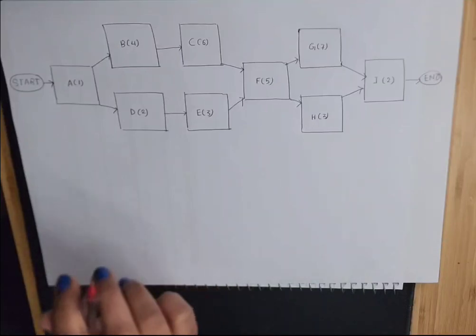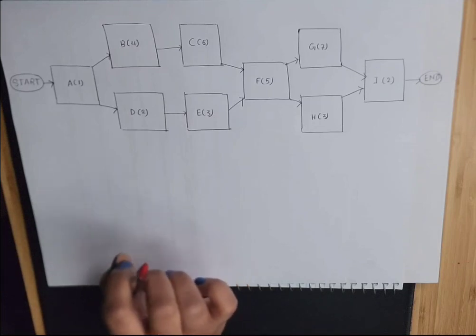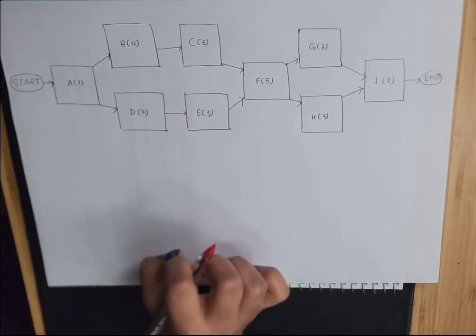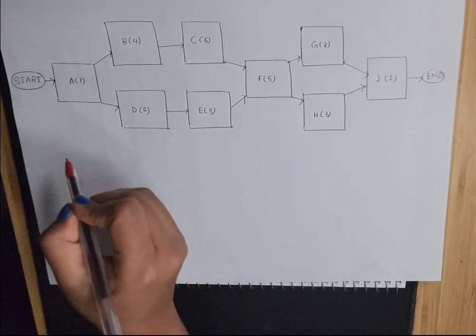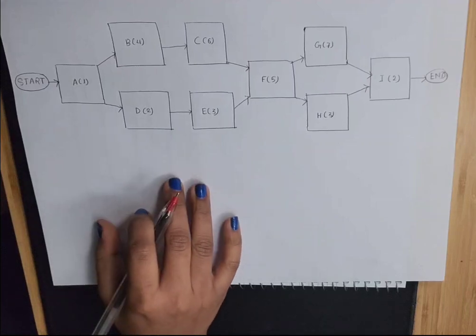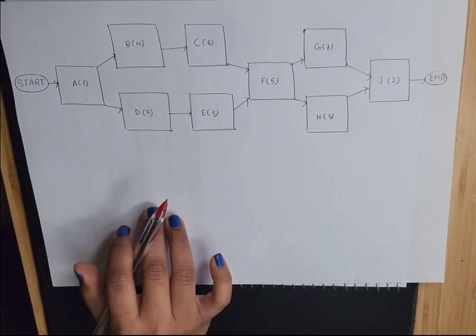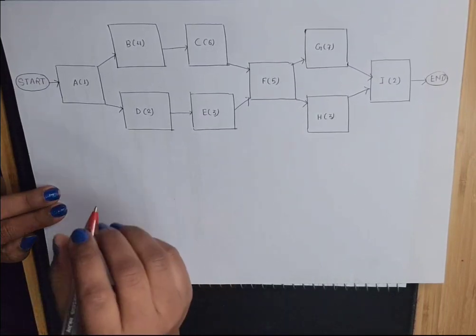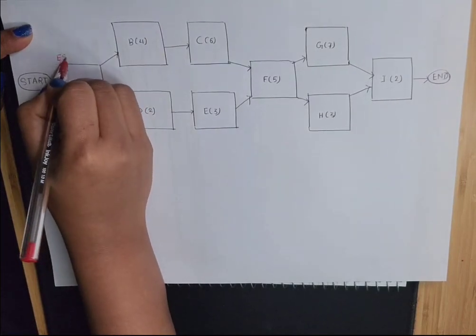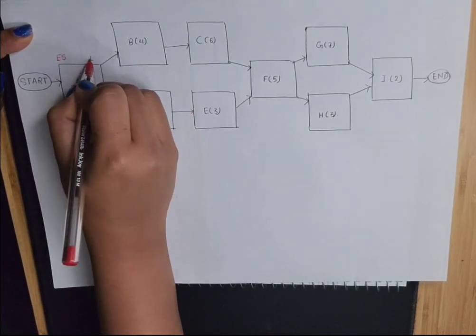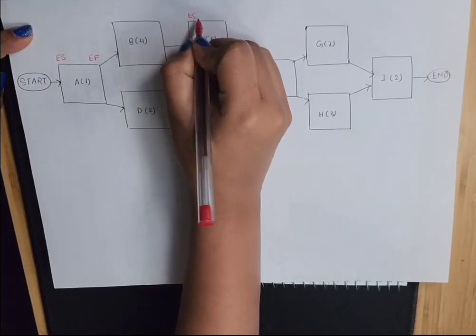Now I'll tell you how to calculate early start, early finish, late start, and late finish for any given project network diagram. To calculate early start and early finish, you must know the duration of each activity. From the question, I have written all the durations. I'm going to write early start on the top left corner and early finish on the top right corner for each activity.